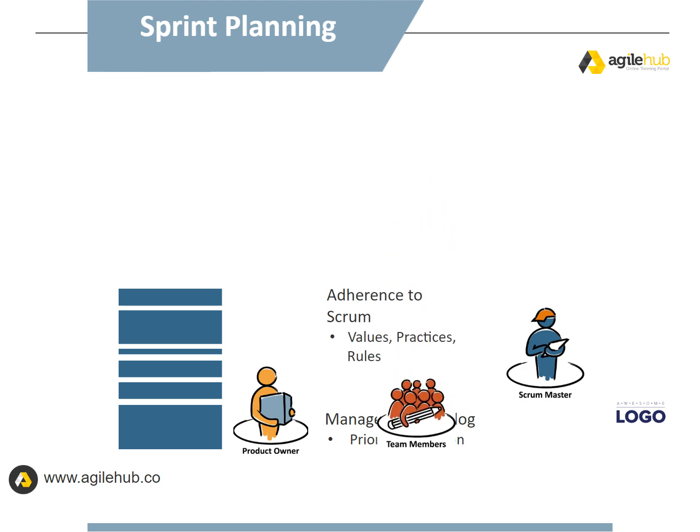Selecting how much can be completed within a sprint may be challenging. However, the more the developers know about their past performance, their upcoming capacity, and their definition of done, the more confident they will be in their sprint forecasts.